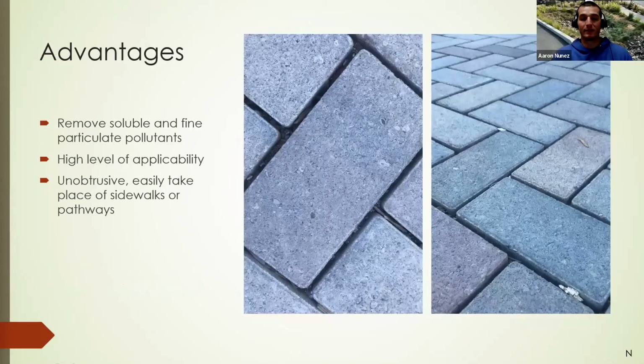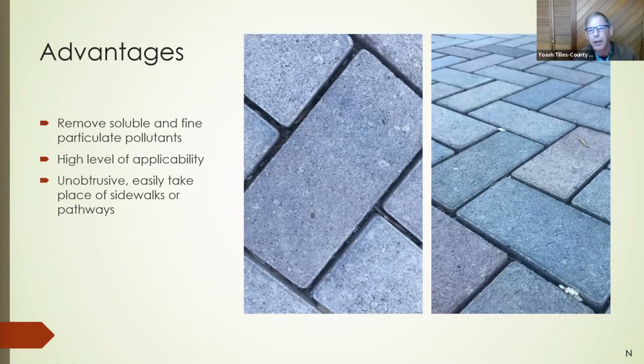Yeah, and I'll say, just as an inspector of these features, I've gone out and looked at features that were just recently installed with porous concrete, and gone out during wet weather, and you see the water is completely bypassing them and going into a catch basin. So it's been a difficult thing to work with, seeing just how much maintenance in terms of keeping those pores clear goes into porous concrete. The other thing, if I may, just one second, Nick, also on porous pavement, we don't allow permitting of those on driving surfaces, on movement, because the material just breaks up. Only on parking areas where the vehicles stand and there's no movement of the vehicles on it.